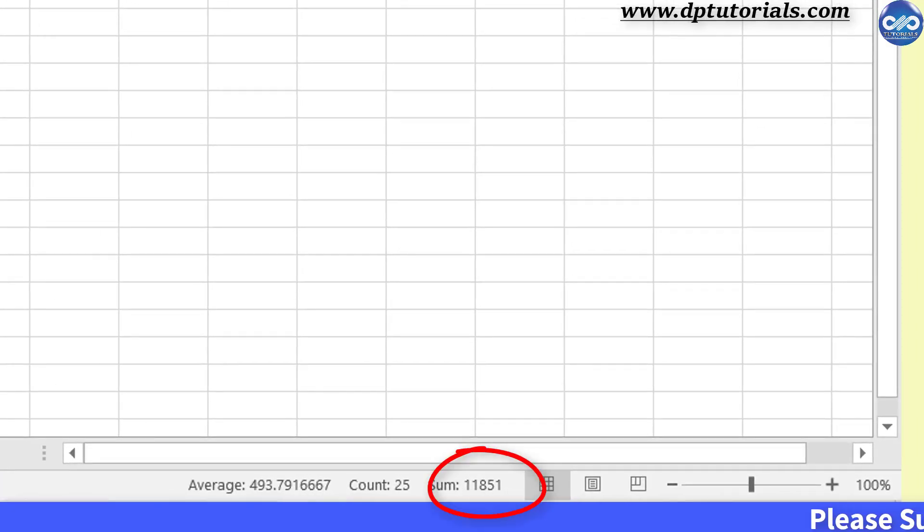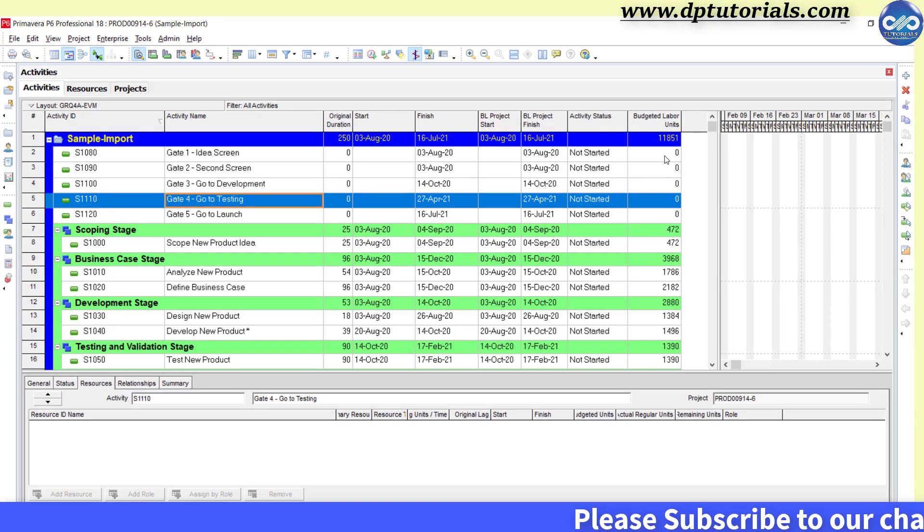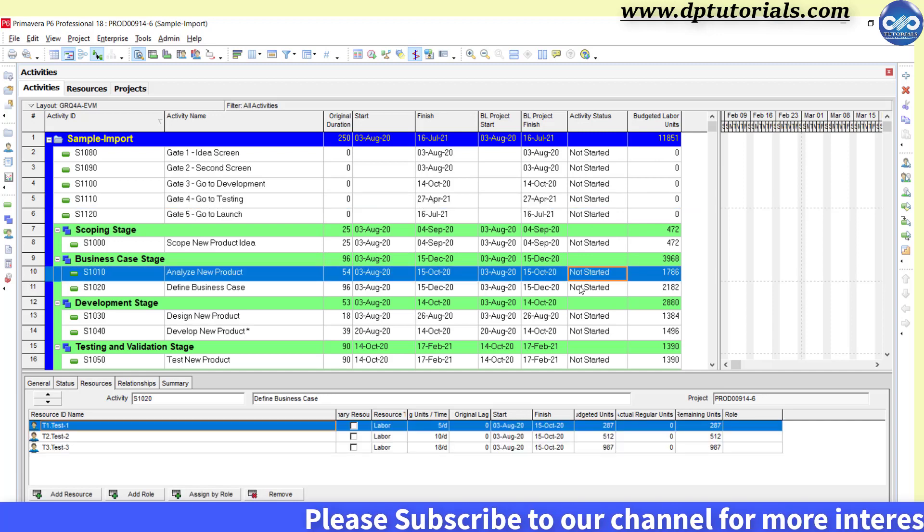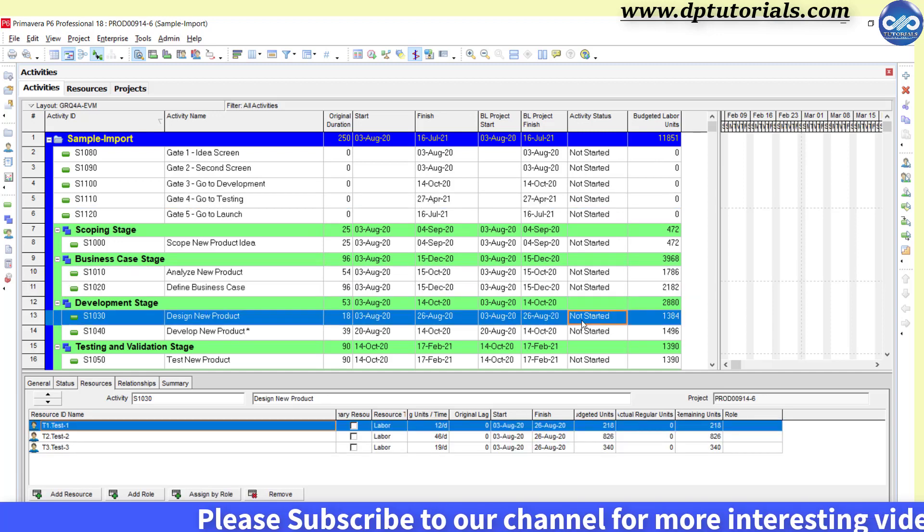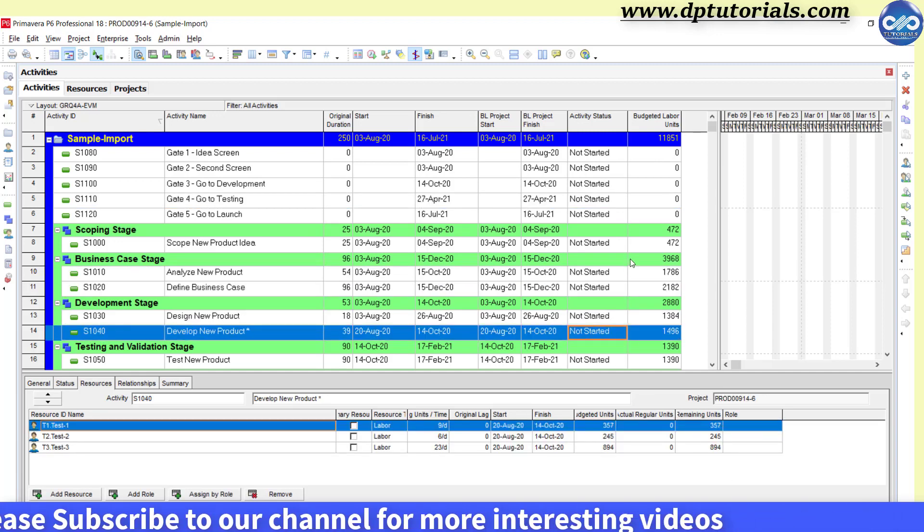You will now see the total budgeted labor units as 11851 exactly same as our planning sheet. Similarly, you can bulk import all the cost data as well into this Primavera. This process is very easy and will definitely save lot of your time.